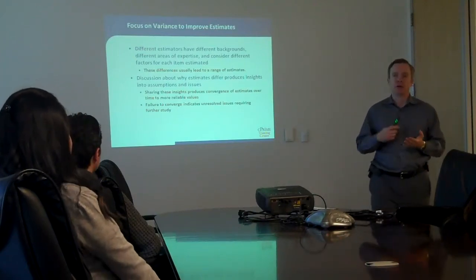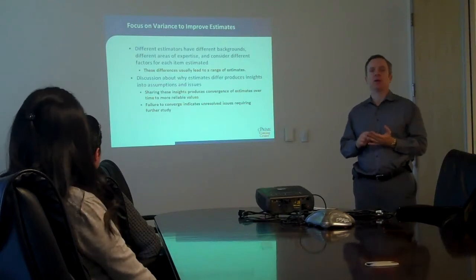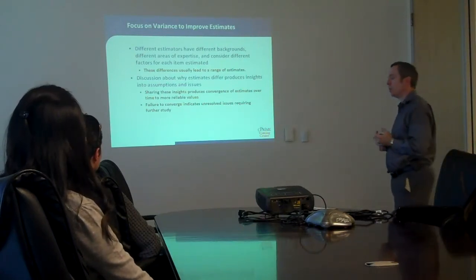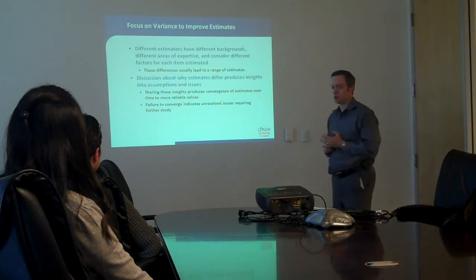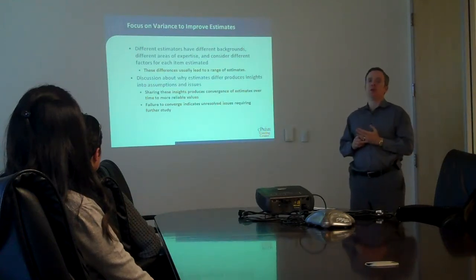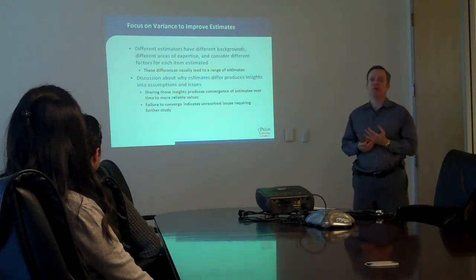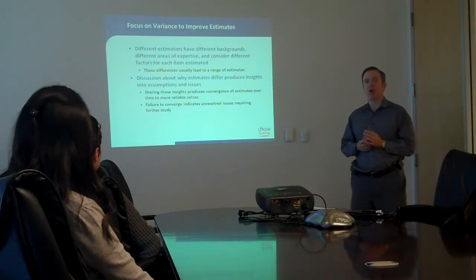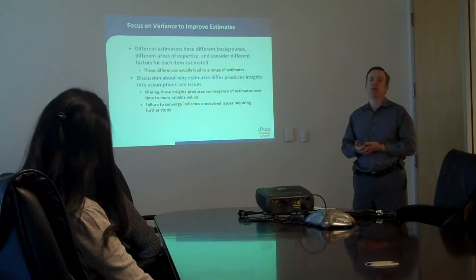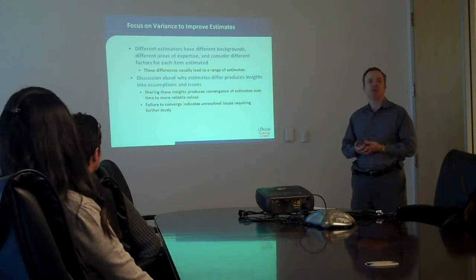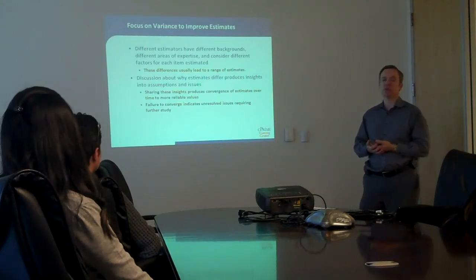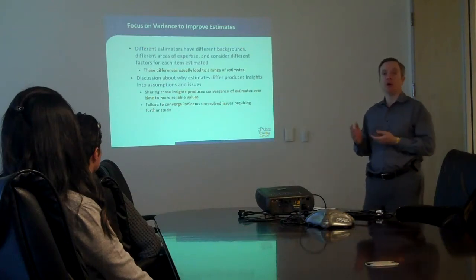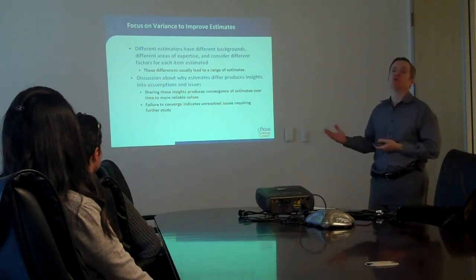The fact of non-convergence tells us something about the problem we're trying to estimate. What it tells us is that there's something wrong with it. Either we're all so ignorant that we have no clue — which is usually not going to be the case — or there's something about the way the thing we're estimating has been written that makes it inherently not possible to estimate. Usually that means there's a mistake, it's really vague, something critical is left out, or a bunch of critical things were left out and we're not even sure which ones they are.